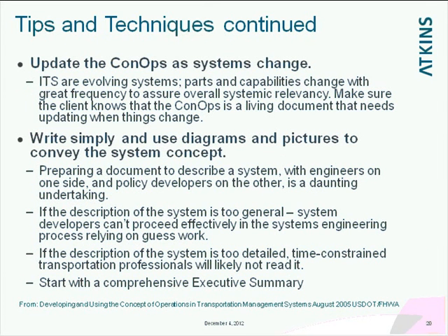Update the ConOps as systems change. It's, like I said, you don't put it on the shelf. It's a living document that needs to be updated when things change. That's what they talk about. There's a life expectancy of most systems, and it's, depending on the business you're in, roughly around 7 years, I think. And it changes.